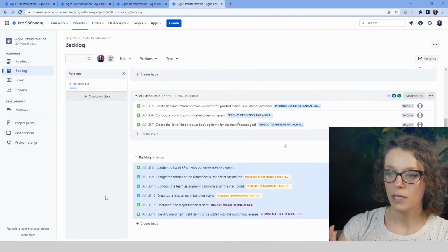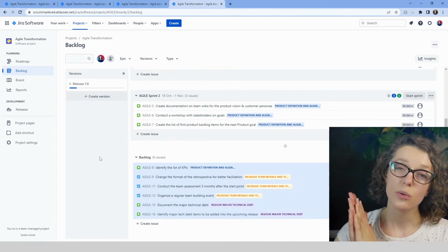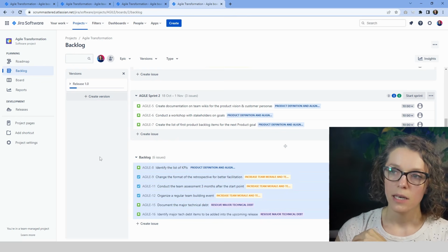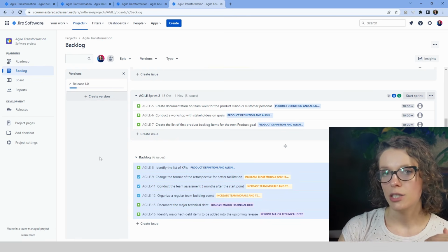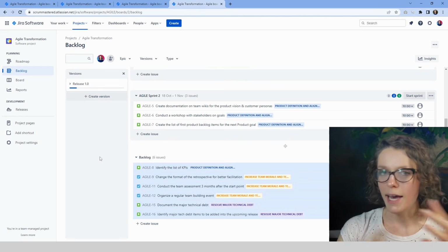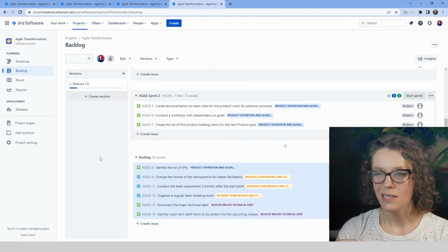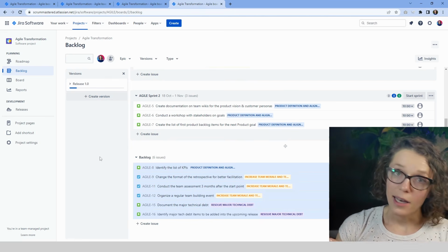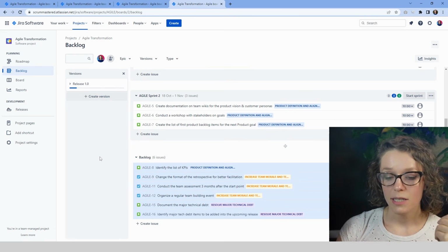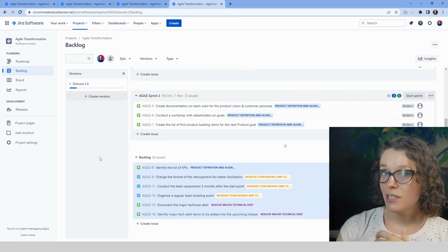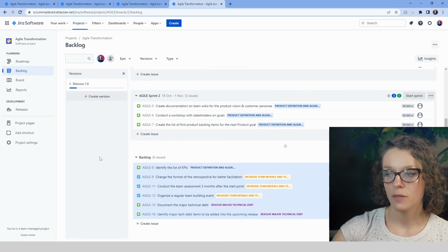Very easy, as you see, I have just selected everything and moved it into release 1. You would want to start with releases if you decided to use them, because retroactively changing which release an item belongs to is a pain. I do not recommend it. And maybe if you want to use releases, start from scratch, planning for the next release.